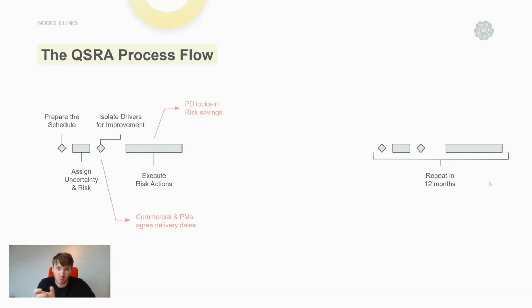So they'd say duration wobbles and risk events. They'd then run a simulation. They'd then take that output and decide what to do with it. So commercial can take the output and decide what to contract with it, and risk management and project managers could take the output and decide how to de-risk the project or accelerate it. And then that process would be repeated in a periodic sequence.